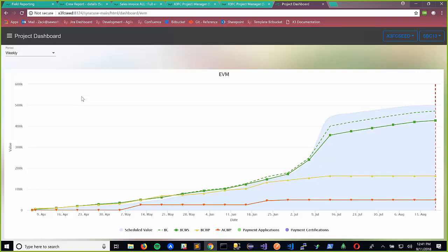The other item is that in the past, the way those costs showed up on the EVM chart was that the WBS node they were attached to needed to have a finished date. So that period had to be closed. Well, if that WBS node covered a 3-month period, I want to see all along the numbers as they're happening, not necessarily once I close the WBS node.